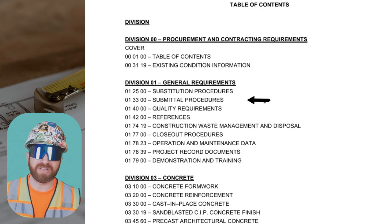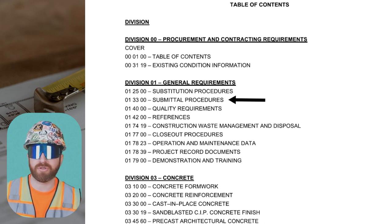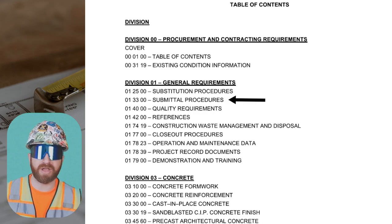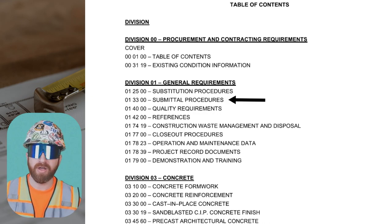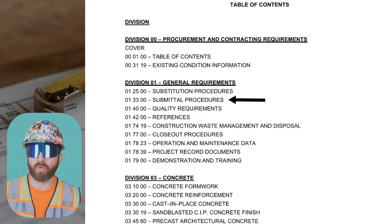Start off by reading the submittal procedures specification section. This should have defined terminology you'll see throughout the spec book. This could include action submittals versus information submittals — action submittals being those you provide to the architect and engineer for their review, versus information submittals that are submitted for record or for the owner at the end of the project.